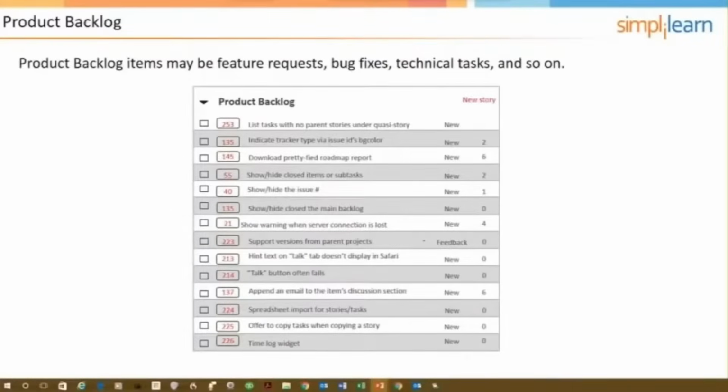That's a given. Does the product owner create all the user stories for the product backlog in isolation? No, absolutely not, because there are technical considerations that the product owner might not even consider. The product owner's perspective is more the customer side, the end user side, and so the product owner might not even think of things like security or architecture-related things, and there might even be user stories that come from the technical domain that need to be developed before some of the product owner's user stories.